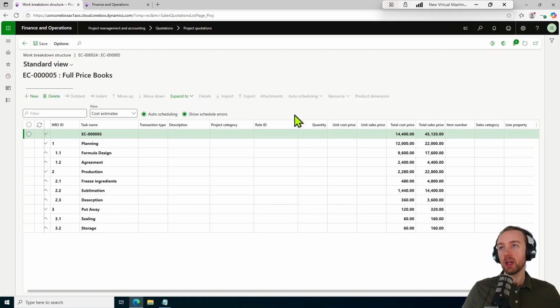And so this is a great thing to have for, for example, construction projects. We can start them out fixed price, recognize that revenue as we complete it based on a percentage. And then also, we won't be looking at this today, but we also have a retained amount that we don't invoice on, but we track as we complete our project and then bill the customer later on.